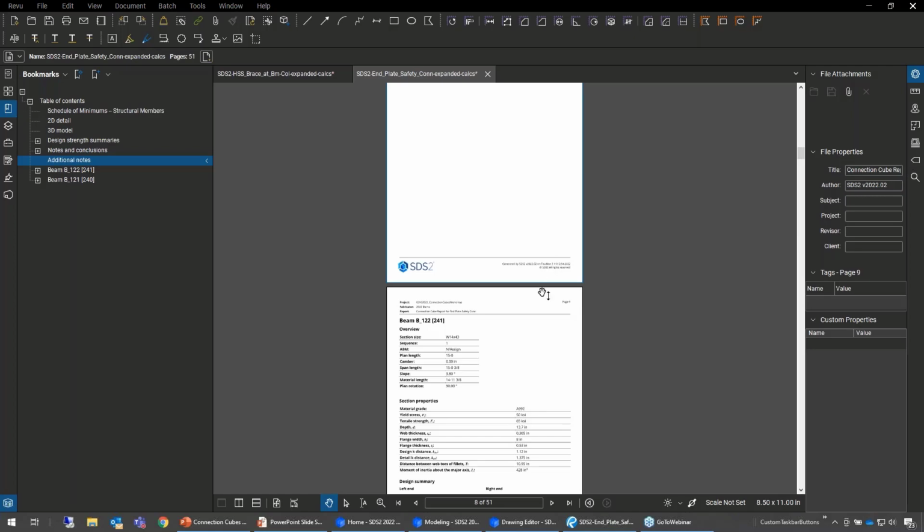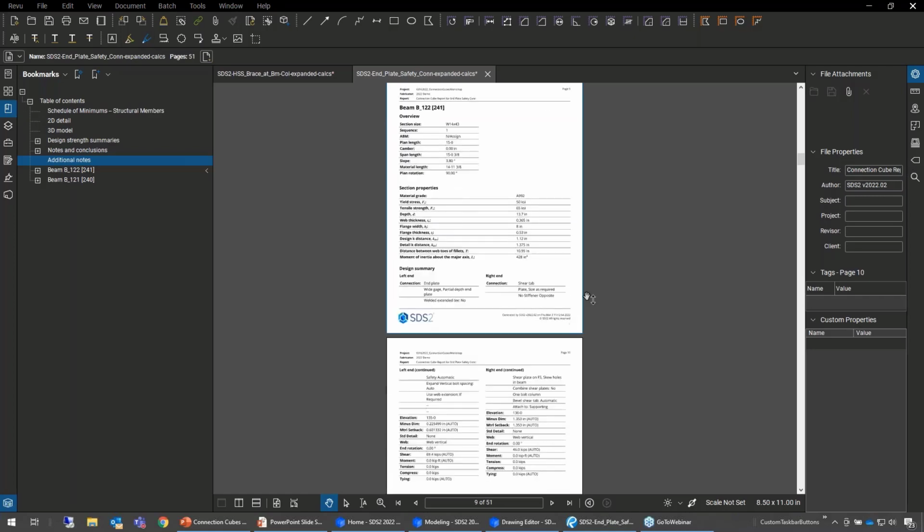Absolutely, this would. So typically, I was used to seeing an RFI come back with like a hand sketch, or maybe not even any images, but just written out like, hey, this connection won't work in this situation. Let me know an alternative, or can we use this instead of this, which was great to have some direction. But depending on where we were in the construction schedule, certainly this could be a red hot RFI where I need to drop all my other work and take a look at this now, because there's guys out on the site waiting to install this, and money is just being flushed down the toilet.